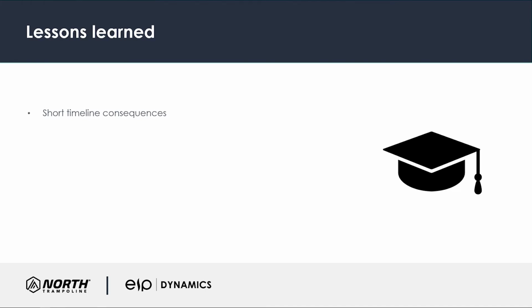All right. Thank you. Because from our perspective, this short timeline definitely led to what Karol described, the necessity to have two teams. So it obviously helped us to move quickly, but did it also backfire, Karol, in some way? Yeah, that's correct. The short timeline and division into two teams helped us to achieve the overall goal to go live in January. However, on both sides, on EIP Dynamics and North Trampoline, there were different people involved with Sweden, Norway, Germany, UK and US, which led us in the end to slightly different setups of the system. So that was the consequence of the short timeline.